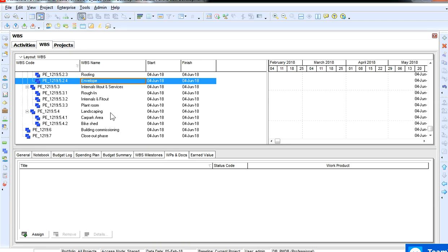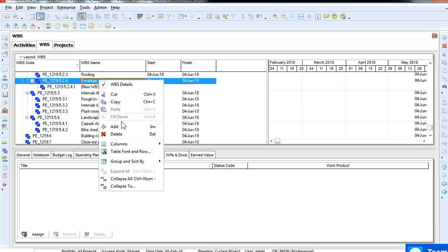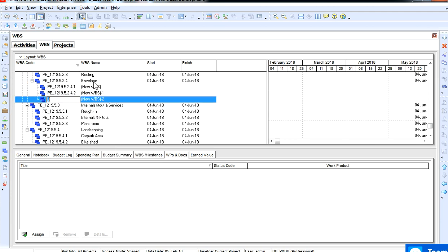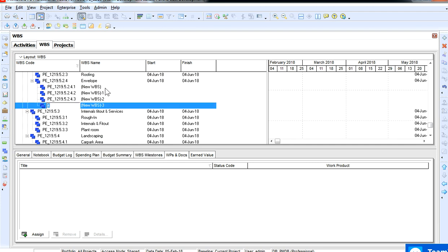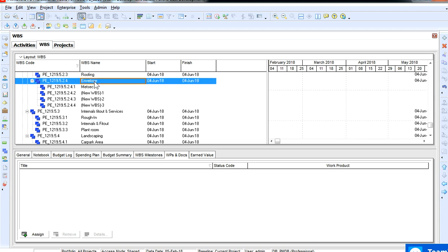You come back to your program, in the envelope bit, you know what the configuration for the envelope is. Okay, so you add the WBSs for those, right? So we've got rain screen, we've got aluminium, we've got glazing, we've got SFS framing. All right, so you add all of those, but the first that gets done is the METSEC, yeah, and then the SFS framing goes up.